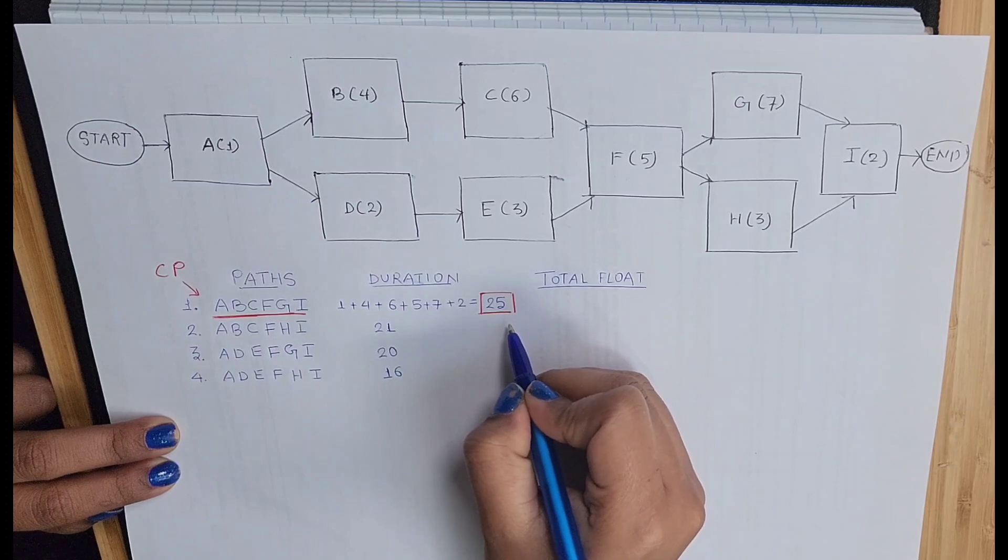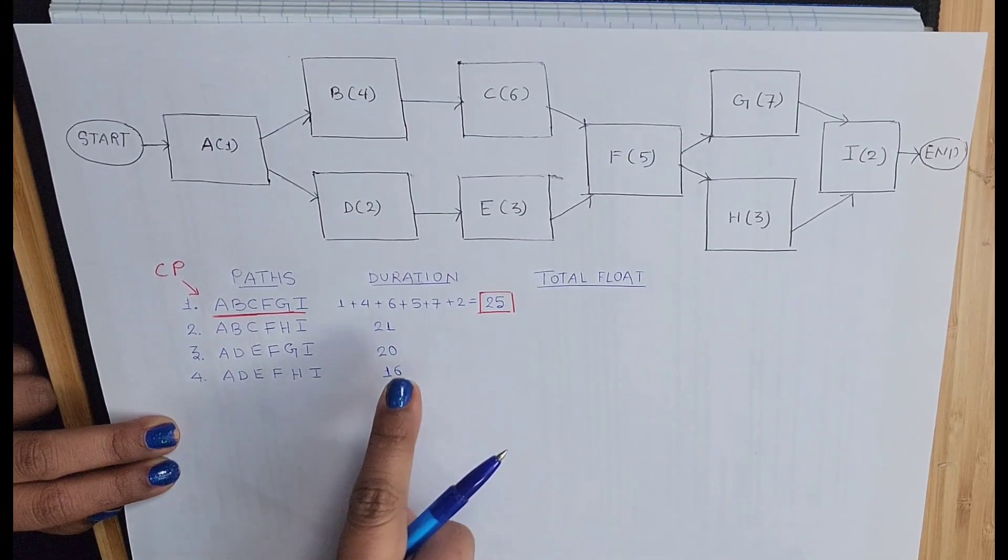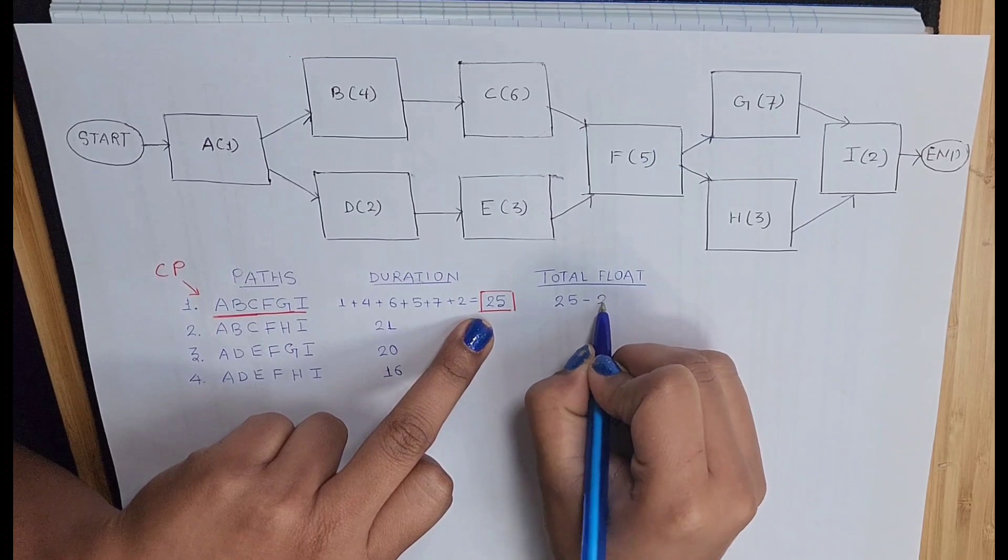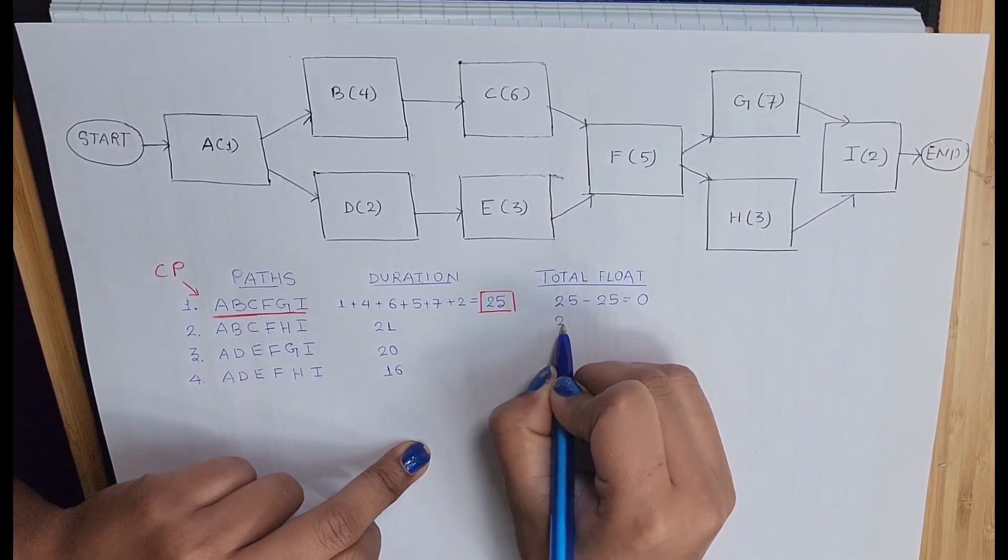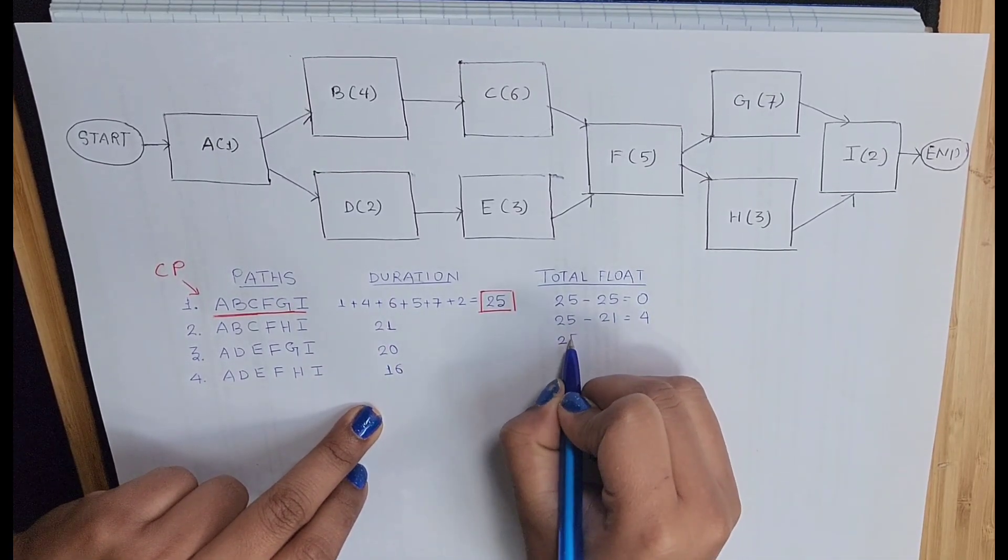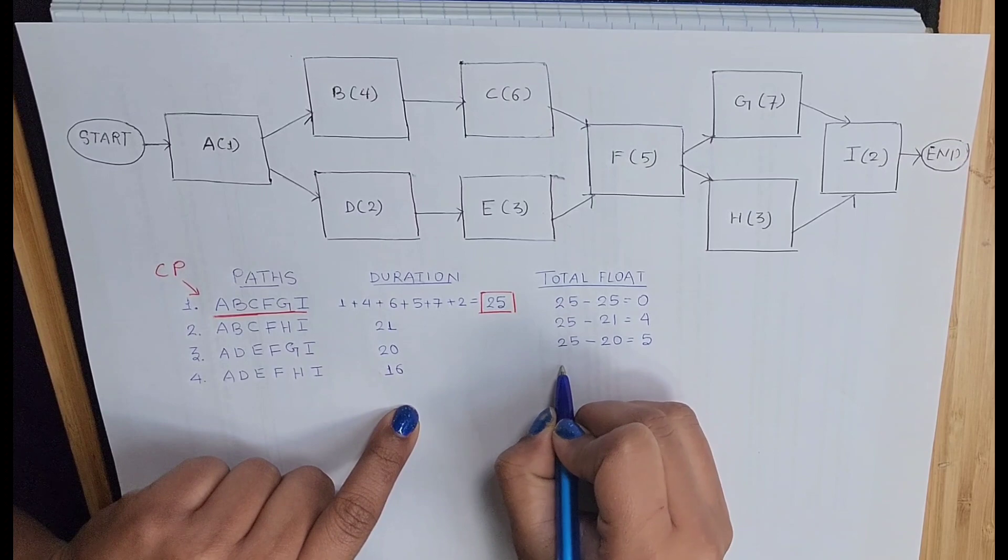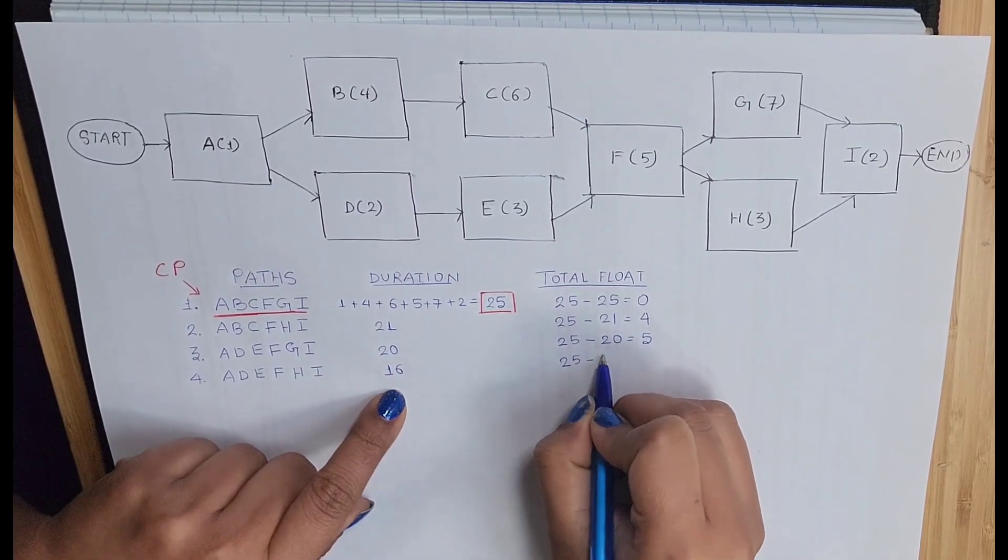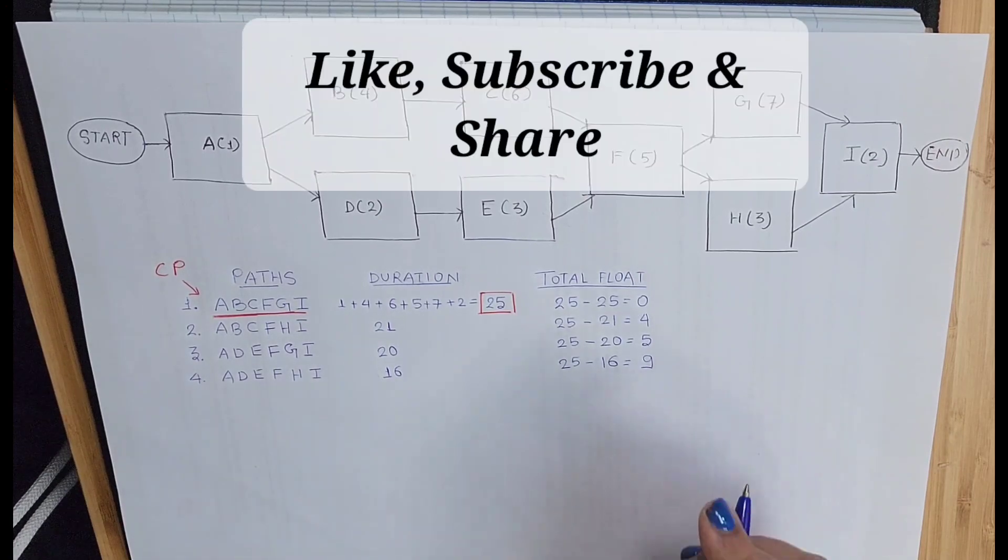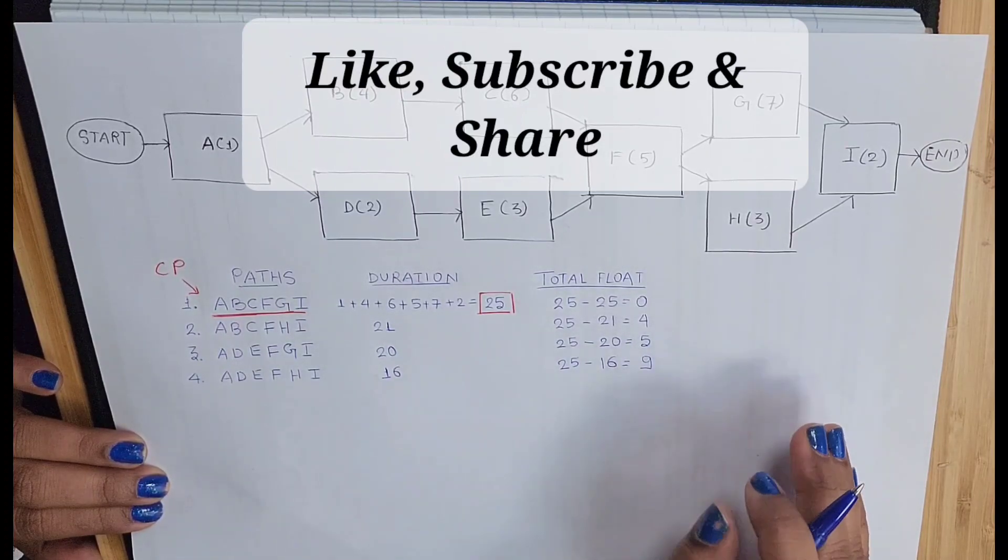So now to calculate the total float, you need to use your critical path duration and you have to subtract all the actual durations of each path. Which means your critical path duration is 25 minus this path, which is again a critical path, so it's 0. Then critical path duration again minus this path has a duration of 21, will give you 4. Then again, critical path is 25, this path has duration 20, will give you 5. And again, critical path duration minus this path has duration of 16 days, so you have 9 days.